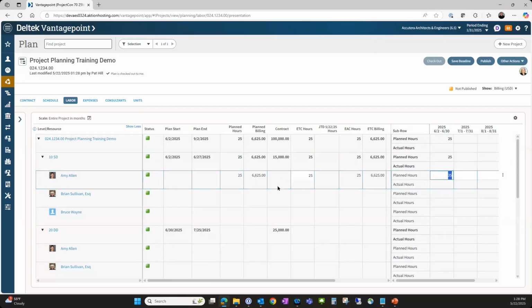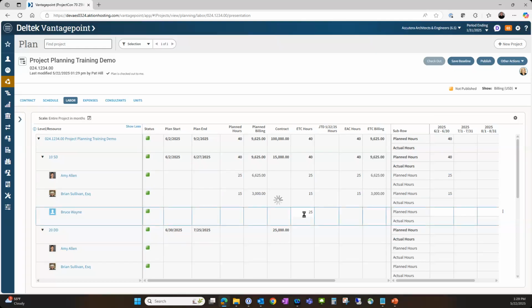So that way, as I'm planning, I can see how I'm doing, right? So then I'm going to say, well, Brian's going to give me 15 hours. And Bruce is going to give me 25 hours. Right, so I can see that as I'm planning here, it's rolling up against my $15,000. It's telling me how many hours in total that is. And then it's putting the hours over here in the right-hand grid. So because it's all happening in June, all those hours are showing up in June here.